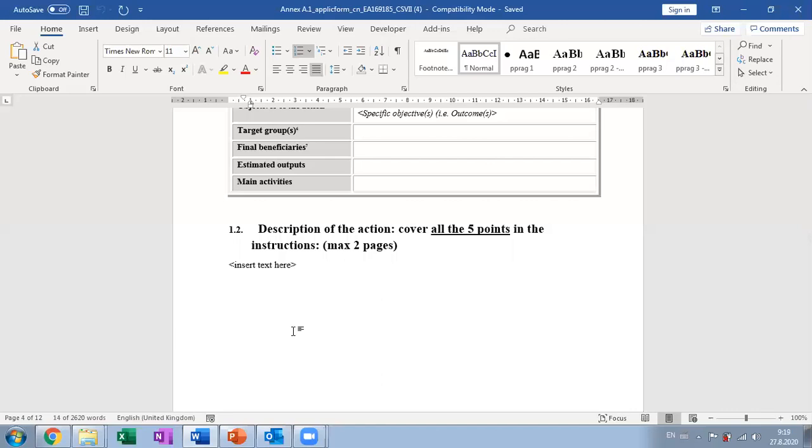In this particular moment in the concept note, you're only requested to present brief information on activities, explaining when they start and when they end, perhaps the months they start and end. If this can be briefly presented in the concept note, and if there is sufficient space, you can include a simple Gantt chart. I wouldn't recommend developing a full Gantt chart and including it in the concept note, because I'm sure that it will be more than a page and a half.